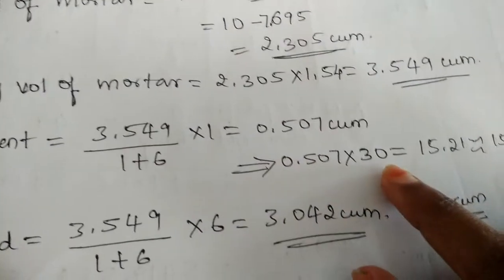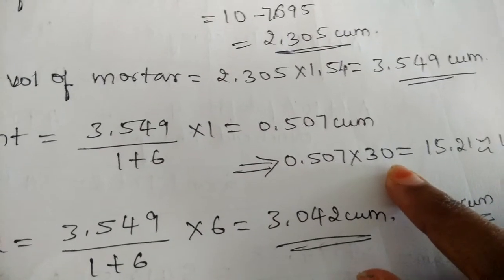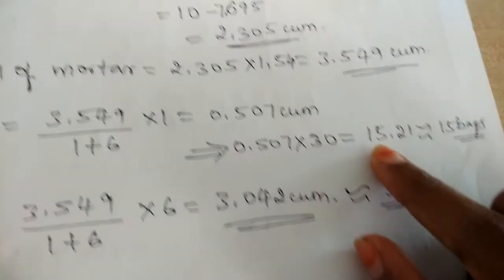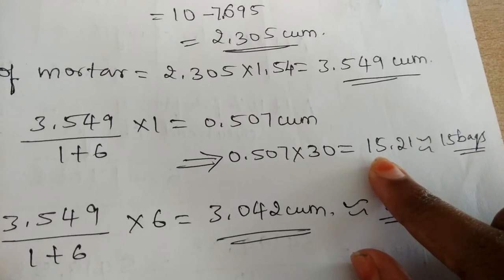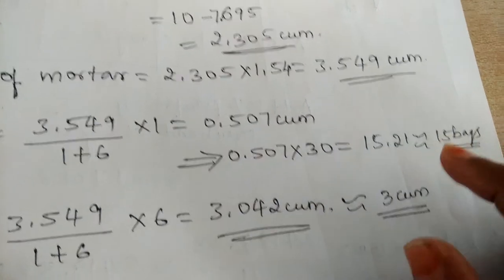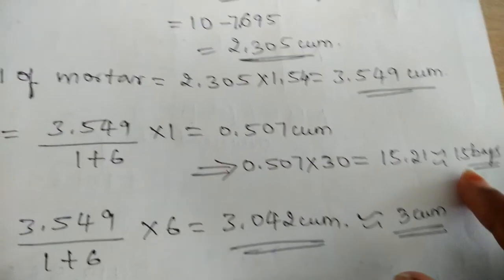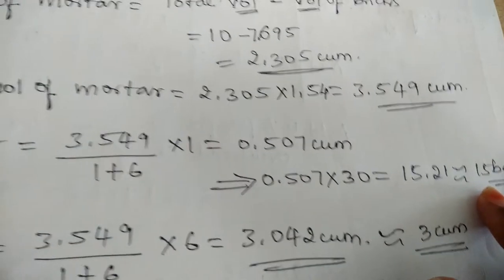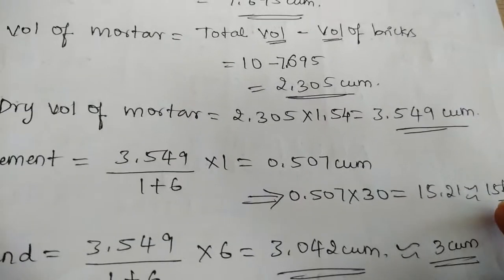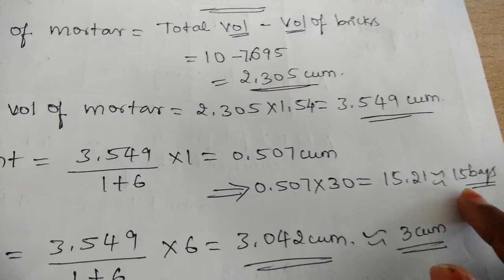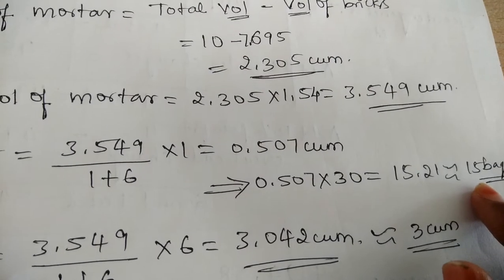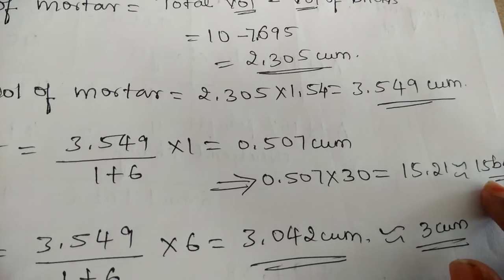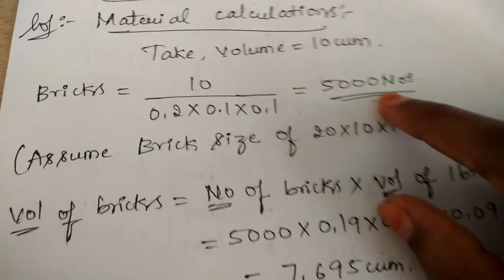On multiplying this with 30 bags per cubic meter, we get the total number of bags as 15.21 — approximately take 15 number of bags. So it requires 15 bags of cement for 10 cubic meter of volume.